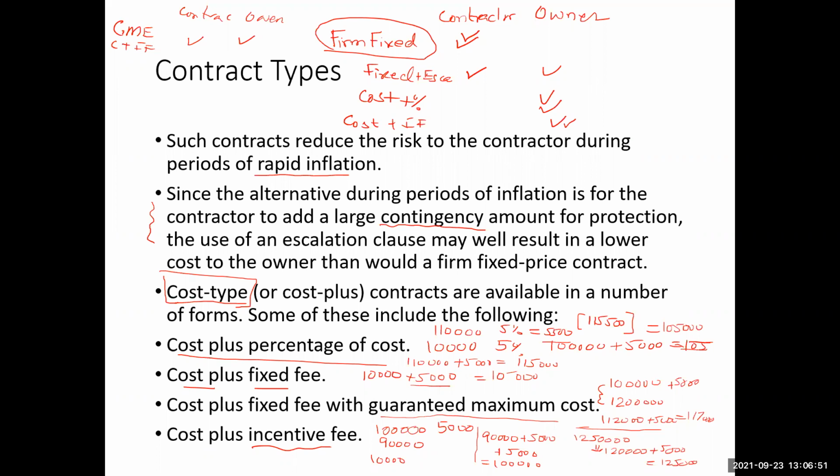Therefore, this type of contract provides an incentive to the contractor to reduce the cost. So I think both contractor and owner share the cost, but only in this incentive fee contract does the contractor have the incentive to reduce the cost.